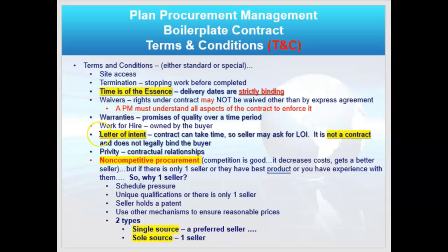A letter of intent is the only one here that is not an actual contractual vehicle. If I give you a letter of intent, you cannot go to court or to the bank and get a loan to participate in this business. The bank may give you a loan because they like you or that you have good credit, but not based on the letter of intent. It's not a contract.